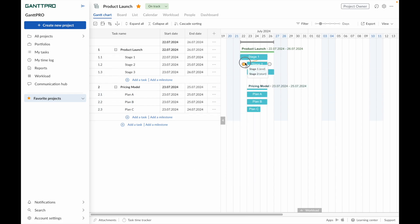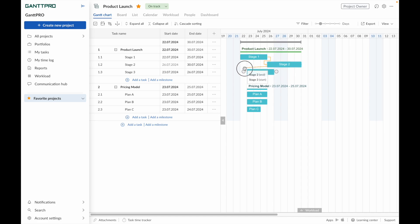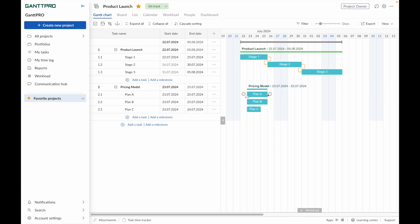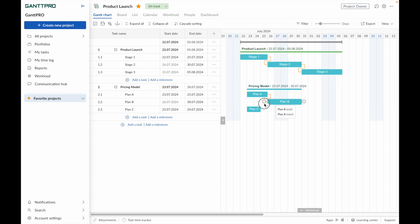If necessary, set dependencies between tasks. They will help you to define tasks' order and connections between them, follow their progress, establish a critical path on a Gantt chart, allocate resources properly, and many more.